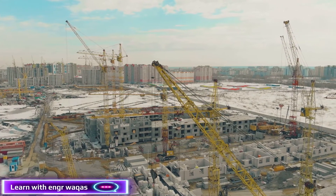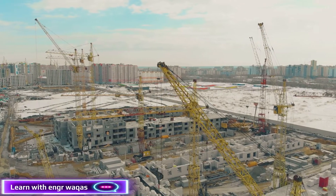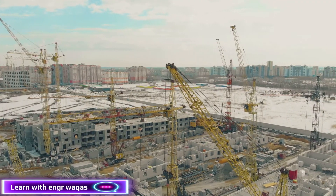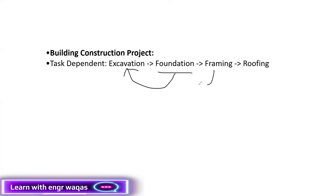There are different kinds of activity types. Let's say I'll give you an example in building construction projects. There is task dependent activity. Task dependent activity is going to depend on the logic of your project. For example, foundation depends on excavation, framing depends on foundation, and roofing depends on framing. That is task dependent — the activity which is going to depend on another task, with predecessor and successor logic.